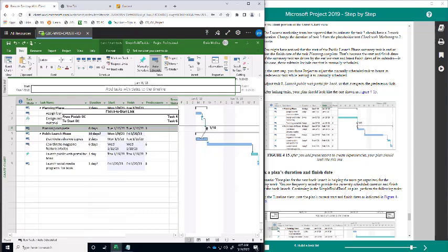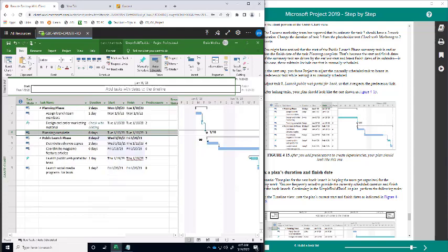I'll try to drag it. I'm not really dragging it, right? I'm just holding. I'm just selecting the mouse to drag this, and I'll drop it on task 6. Okay, I'll drop it here. And now what I'm really saying is that task 6 will start only after task 4 has ended. Okay. Again, this is a visual way of doing the same.